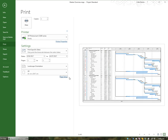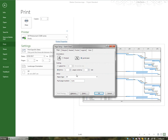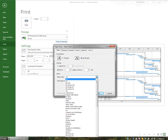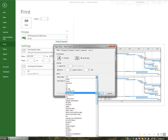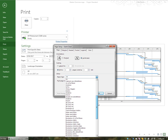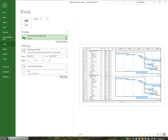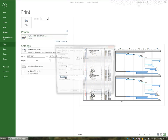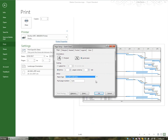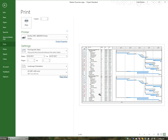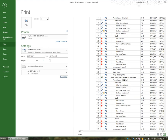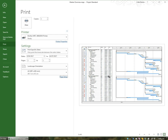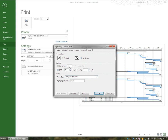I'll zoom out and go back to page setup. I do want it to be landscape and fit on one page, but how about we change the paper size to A3. You're only going to get A3 if you're connected to a printer that supports A3. So I'll cancel out of here, change to a printer that supports A3 — the Brother — then go into page setup, choose A3 which is a larger page, and click OK. It's a lot more clear when I zoom in. So I've gone from six pages to one page, printing in A3 landscape.